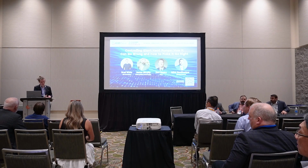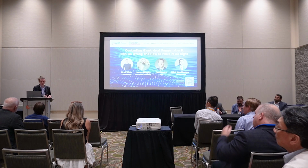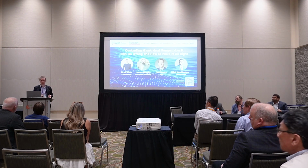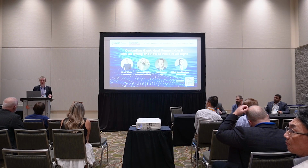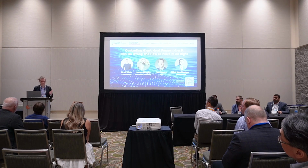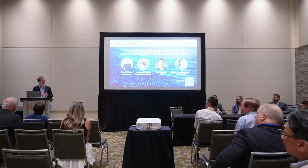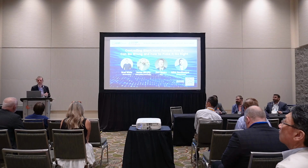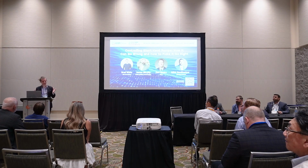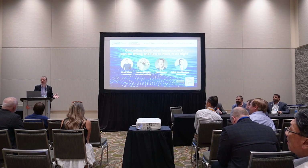And I think one of the things that we see, especially on the commissioning side, is that if you don't have somebody on that project who knows how that thing should work, and they aren't really involved, the project team is going to make a lot of assumptions, and they may not be the right assumptions. On that same project, I got to the end of it, and the contractor's like, so what are these heat pumps here for? His perspective was, well, why don't we run the boiler more? Because that's cheaper. I'm like, the whole point of this is the owner is trying to get carbon savings. But that had never been communicated to the contractor.